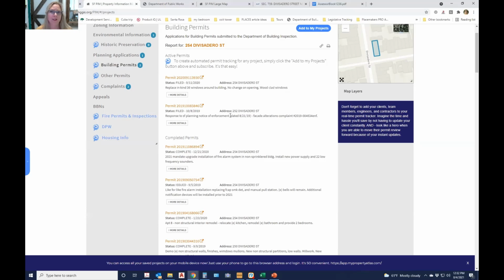And or can I just file my plans as a revision to an already open permit, which could be a little bit simpler of a process with the city. So depending on what the condition and situation is, I do like to make sure, again, if there's time that I need to spend cleaning up some permit nonsense or some complaint nonsense for them, I like to make sure that I factored that into my proposal before I write it.